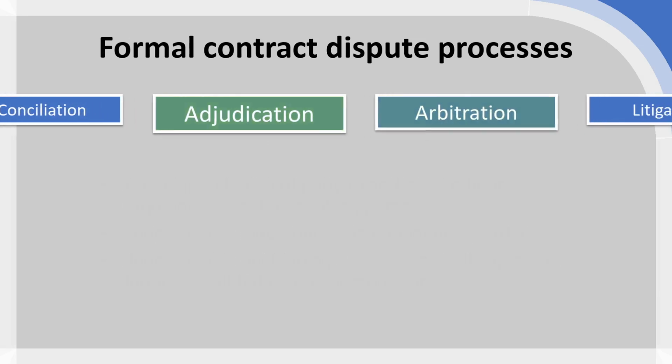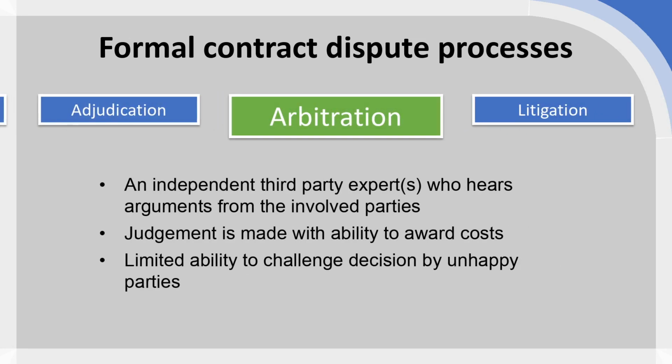So the alternative to adjudication, but still avoiding the court system, would be an arbitrator. And with arbitration, you would still have an independent third party here. It's worth pointing out that arbitration in many cases is contractually required, and this is because although it may take significantly longer than adjudication, I think with an arbitrator you're looking at really a couple of months at least, but adjudication can be resolved within 14 days or under 30 days, which is usually the goal of an adjudicator.